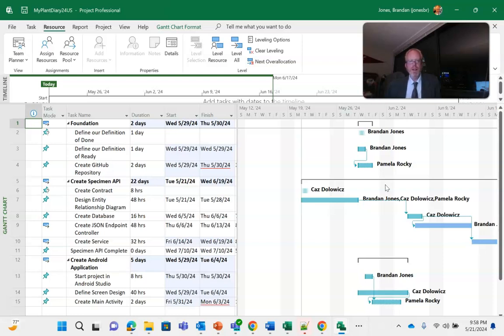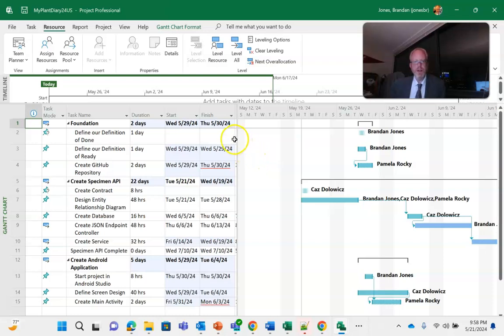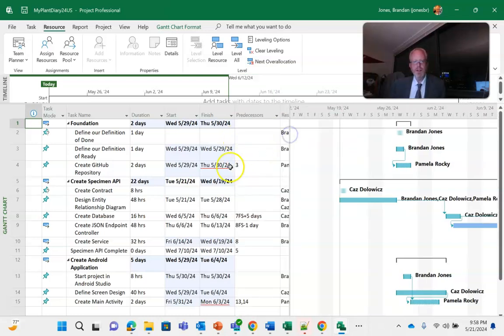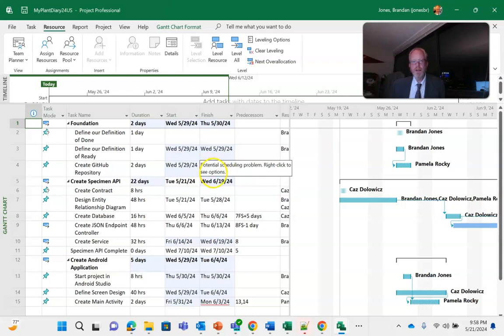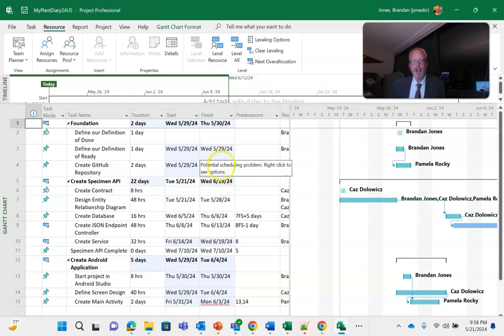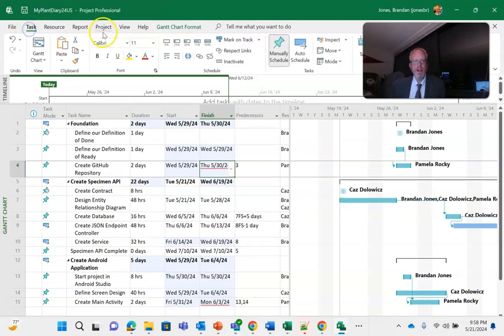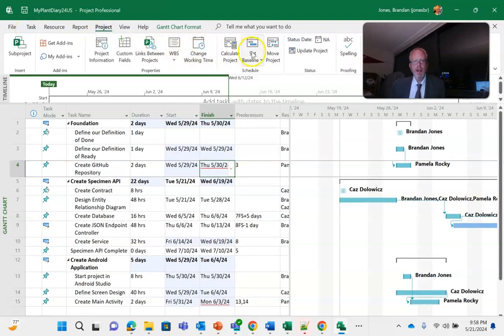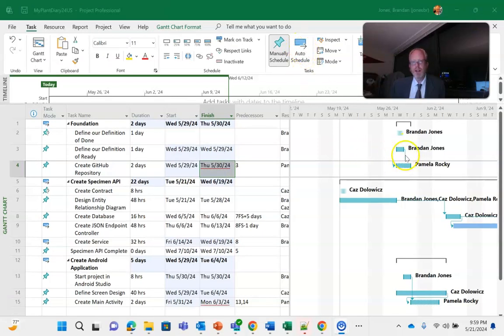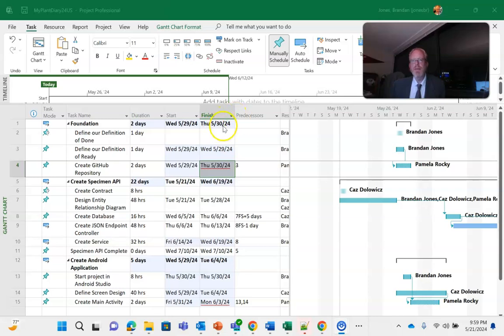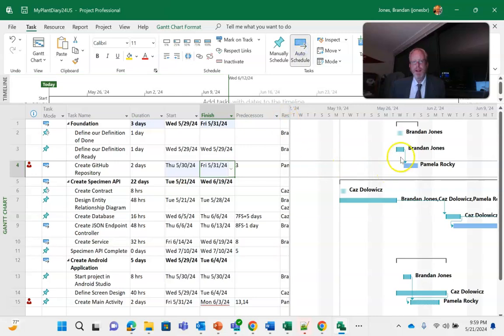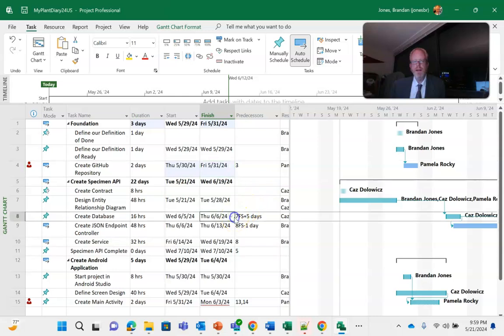We see create GitHub repository now says I can't get done in time, so we might want to go back and say okay, let's auto-allocate these tasks. I choose auto-schedule. Take a look at what's going to happen right here and right here and also the finish date. So we'll say auto-schedule and notice that it makes this work for us, but in doing so it does adjust the finish date. Now we go down to these other tasks and you see that this is kind of interesting.